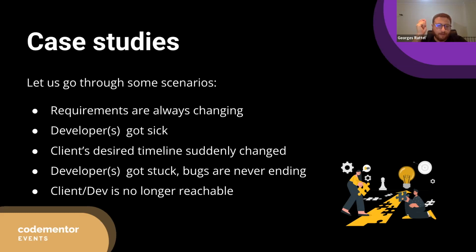It's important to do that because all of the hassle that you do at the beginning will save you much more at the end. That's why most of the projects take like 6 months of development and then a year or so fixing bugs and changing stuff. However, if you invest 3 months of research, then you're going to get 6 months of development and probably 1 month fixing bugs. Certainly not a year.